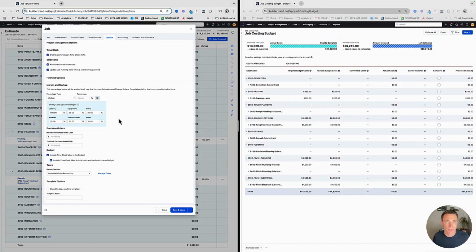I personally, we are not doing that. We're kind of keeping that as general overhead. That's the cost that it is to do our business. Now, of course, if a project is further away, it's going to cost a little bit more, but we're just kind of blanketing that. We're saying we have an administrative cost to run the business. That's going to be here. And these are just on project-specific costs, and that's why our markup might be a little bit higher than others, okay? So that's where the markup lives.